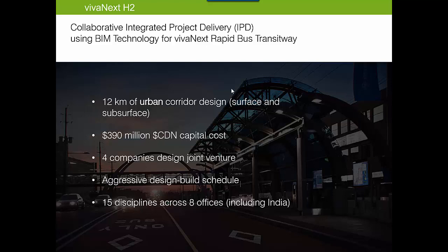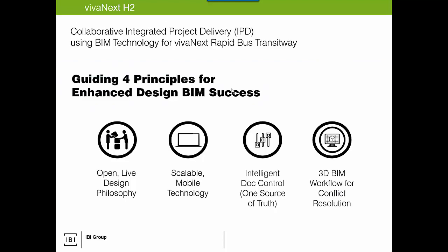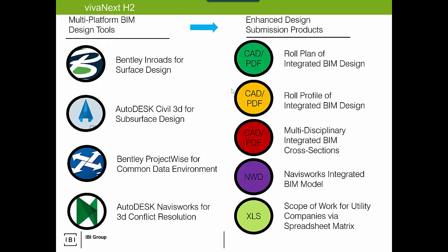Multiple platforms, so we had InRoads as well as Civil 3D, and that was to help for road surface design as well as subsurface design. ProjectWise is our common data environment, and Navisworks for our conflict resolution, and multiple deliverables, as you can see on the left there. All of that helped to feed the BIM execution plan. So all of this was fully documented so that we were able to guide our teams to achieve this.